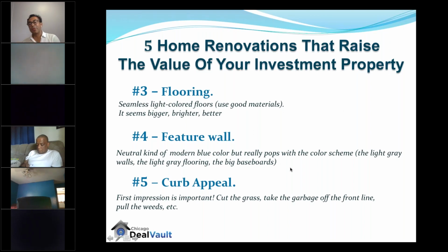Okay, so let me tell you, bathrooms, we don't pay more than 4,000 for labor, and then materials are going to be about 1,500 to 2,000 if you go with really nice materials. So a bathroom shouldn't cost more than 6,000. Okay, that's just pushing it. But typically, labor is going to be 3,000 to 4,000 plus materials another 2,000 to 3,000. So give and take, 6,000 to 7,000 tops for a beautiful bathroom.